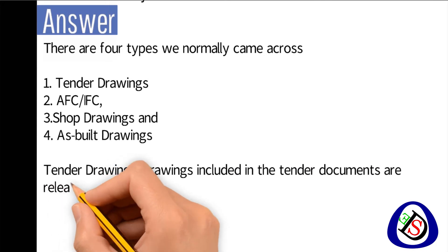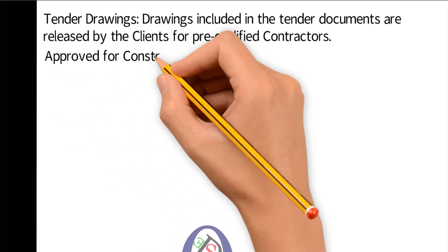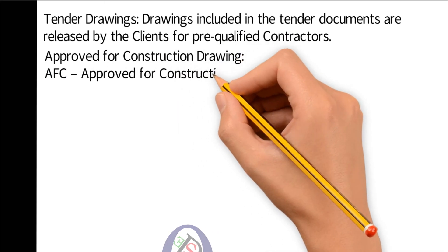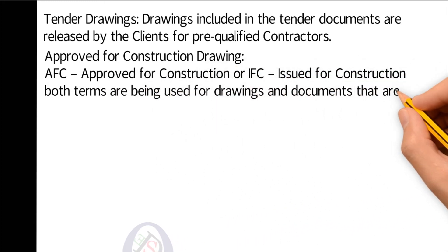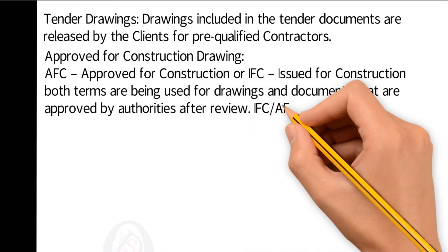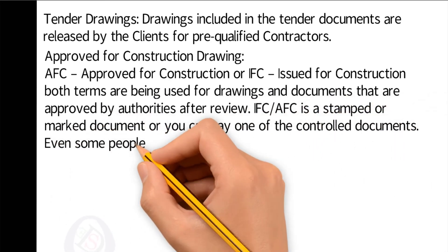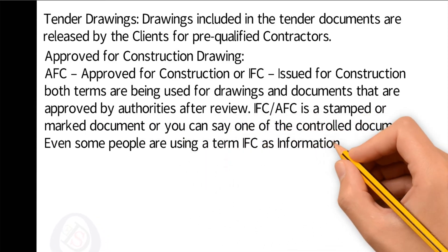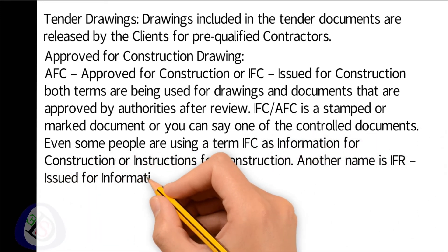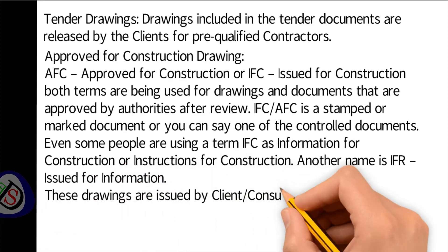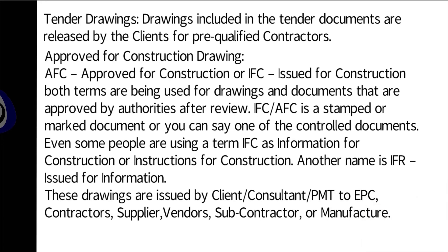Approved for Construction (AFC) or Issued for Construction (IFC): both terms are used for drawings and documents approved by authorities after review. AFC or IFC is a stamped or marked controlled document. Some people also use IFC as 'Information for Construction' or 'Instruction for Construction.' Another name is IFI — Issued for Information. These drawings are issued by the client, consultant, or PMT to EPC contractors, suppliers, vendors, subcontractors, or manufacturers.